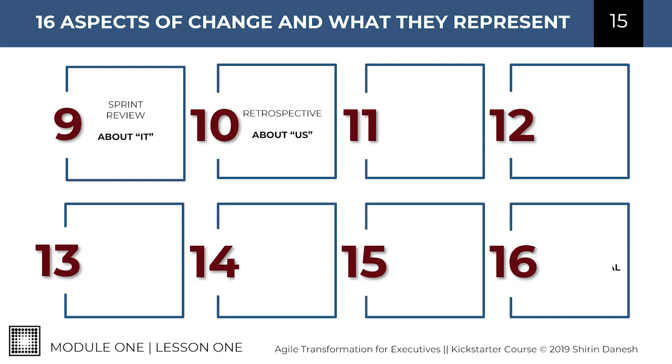Next thing is about Scrum of Scrums. This is a channel where Scrum Masters from multiple teams come together, and if there is any coordination that needs to be done between the teams, that's the channel. Also, that's where they escalate any problems to you, or if you have any directions or guidance for the teams, that's the channel to make sure that teams will receive that direction. What's important is this two-way conversation that is happening in this channel.